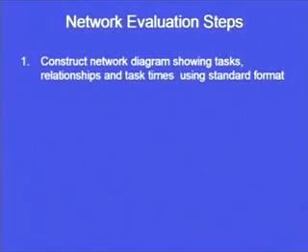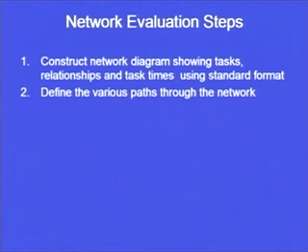Construct the network diagram showing tasks, relationships and task times using the standard format. We have already seen certain very simple networks, but mind you, these are very simple networks that we are seeing in this particular lecture, but the networks can be very complex. We will see towards the end of this lecture certain very complex networks also. So, first step is to construct a network diagram showing tasks, interrelationships and the task times for each and every individual activity. Define the various paths through the network.